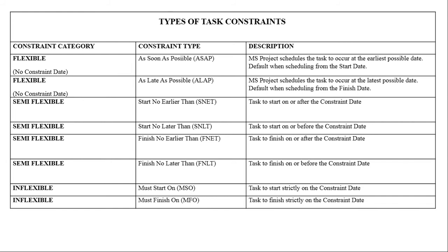A very good example would be if we are producing something that needs to be delivered and the transport is only available on Monday, and we do not have a place to store the things overnight. So whatever we are producing can only be finished when the transport is available. We are saying it cannot be finished before this particular date. This is where we put the finish no earlier than, so that by the time it's finished, the transport is already there to carry the stuff.